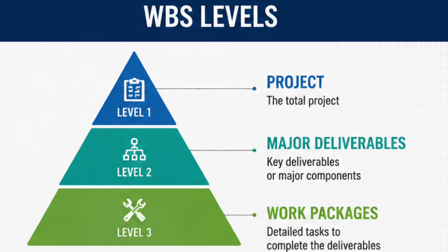Then the next WBS we can consider is project management. That could include your organization chart, your project execution plan, your project management plan, and your risk management plan.